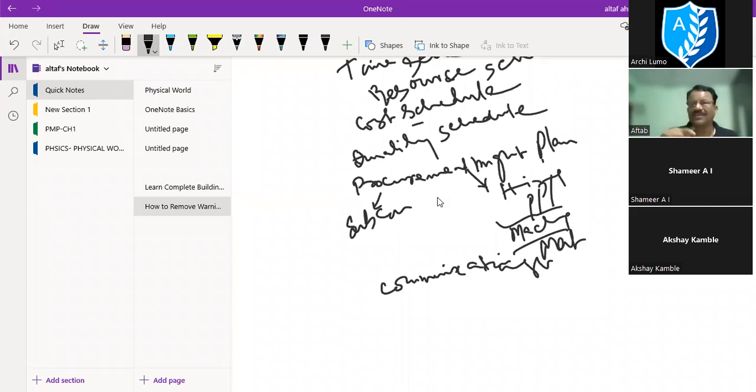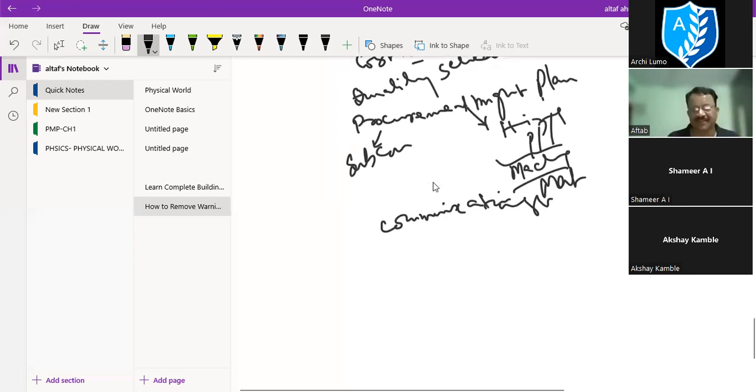Why? Because all the mails cannot go to the project site engineer. Those mails which go to the chairman or project sponsor normally cannot go to the site engineer. So lots of things have to be finalized and planned, that is, which communication has to be given to whom. Some secret information cannot be shared with all the project team members. It has to be shared with the project sponsor or GM or VP, these people. So a complete communication management plan also has to be produced in this planning stage itself.